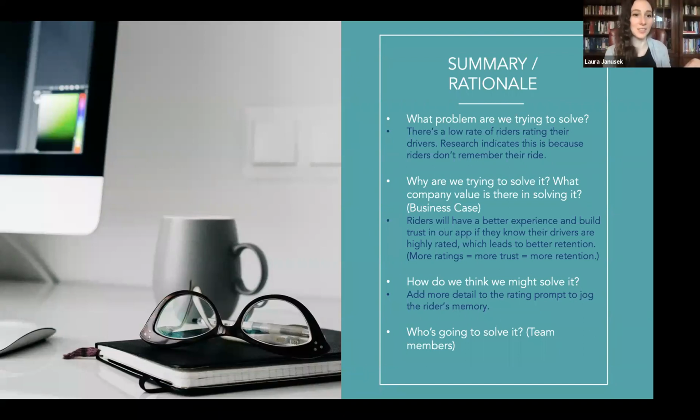Awesome. And of course, if it was a real team, you would actually list explicitly people's names, like this person from design is going to be doing it, this dev team is going to be working on it. Getting really explicit on who's involved. And there are even whole little frameworks around that section about the team members, like DACI or RACI, or different models for designating team members.